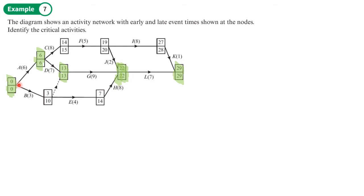So for example, if we were down here, we've got three, four, that's seven, plus eight is 15, 15 plus seven, that's only 22. So these things could be delayed. We won't get up to the 29. Same here. Six plus eight is 14, plus nine is 19, plus eight is 27, plus one is 28. So there's a little bit of what we call slack here. These are the critical events here between these critical activities.